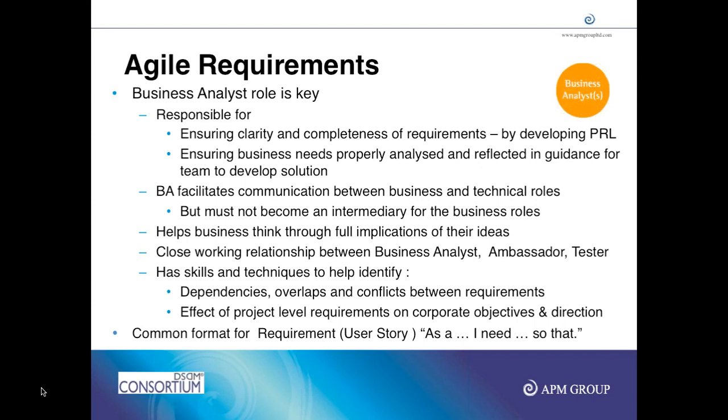What we need to make sure is whenever we have any change request or any requirement related information, we should compare it with the baseline requirement list at the time of foundations. As long as the requirement was identified during foundations, we don't consider it a formal change request. If you remember, yesterday we talked about two terms, the breadth and the depth.